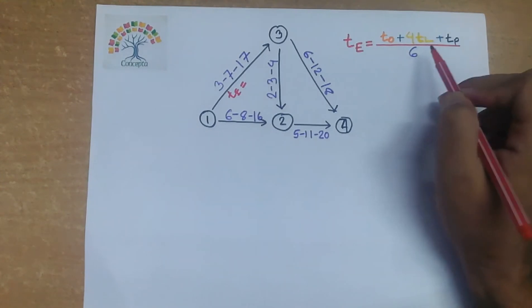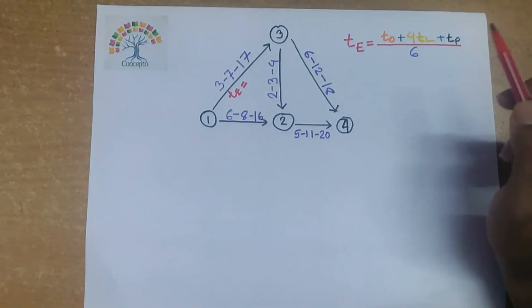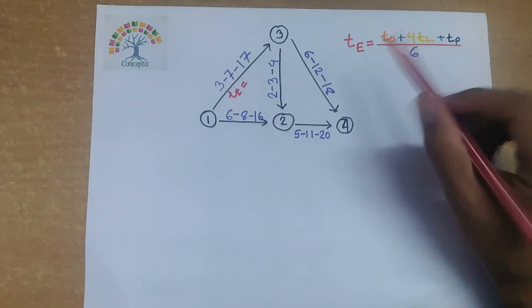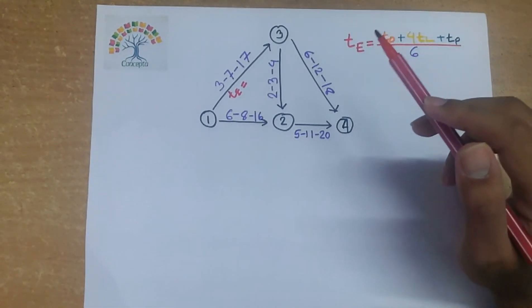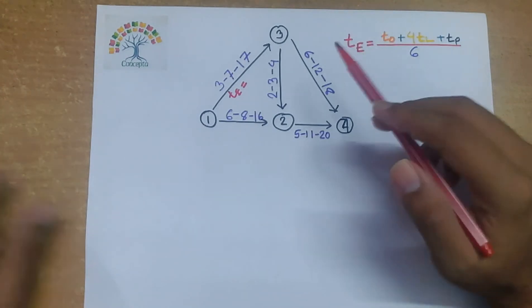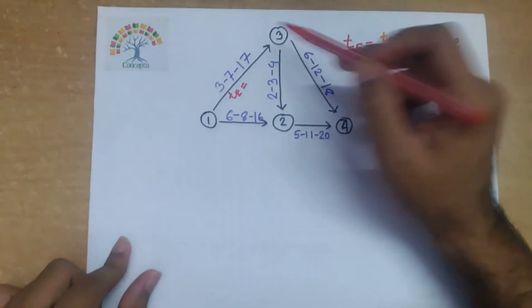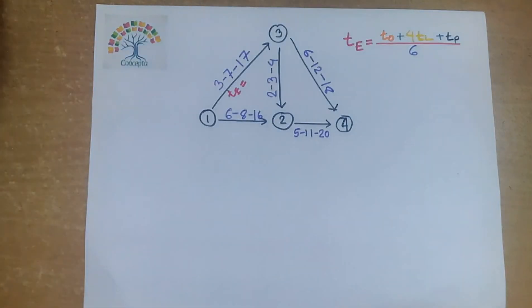te equals to t0 plus 4tl plus tp by 6 is a part of repetitive calculation of any PERT network diagram, so hand calculation will be time consuming. So for huge PERT network diagram, we can solve it by calculator within a short period of time. So let's apply the trick for this individual PERT network diagram.